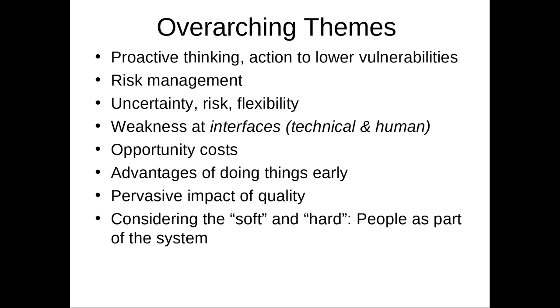And ladies and gentlemen, there are many drivers for defects in the system. Identifying what left us vulnerable and what we can do better is one of the most valuable things you can do, even if the defect is never fixed. You can ask how to avoid it next time and how we could have detected it sooner to prevent it from wreaking its havoc, okay? So just remember that. Give me some practical reasons you might not fix a defect if you saw it.